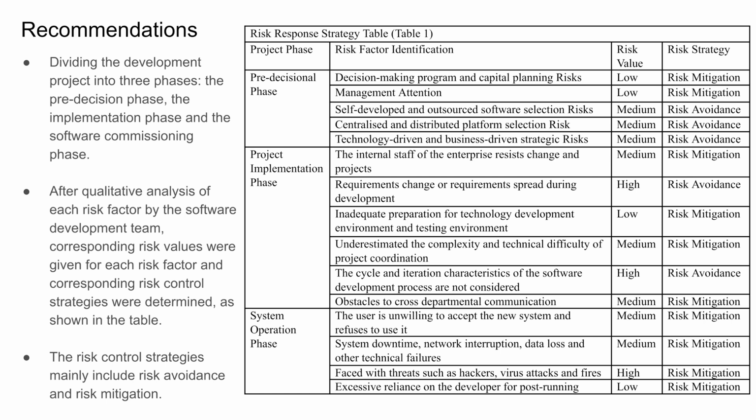Due to the time accumulation effect of the risk, if risk control measures are not taken in a timely manner in the feasibility stage, the risk will accumulate in the future and may significantly increase the difficulty of risk control in the next stage. Therefore, this report gives a detailed response plan for risks with high risk value, effectively controlling risks with high impact and high probability of occurrence, and avoiding the impact and loss in the project construction.